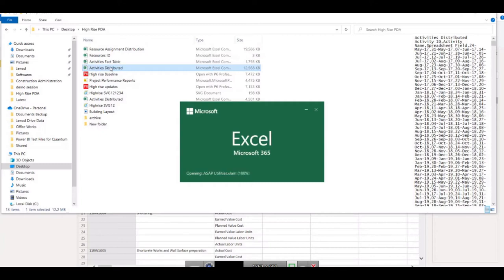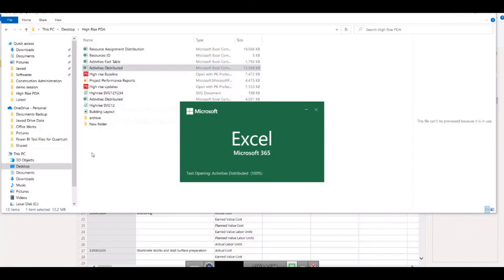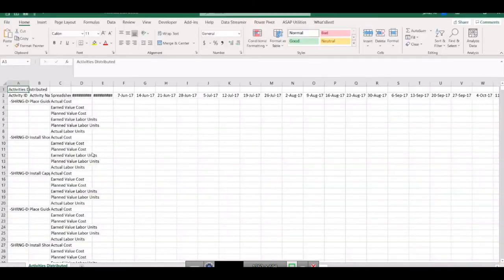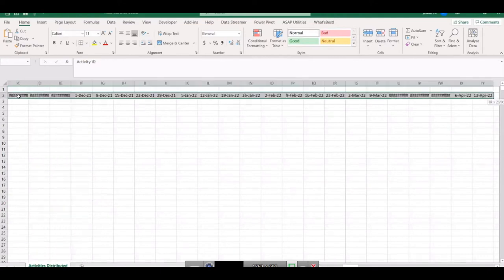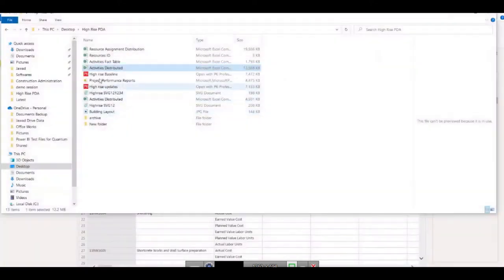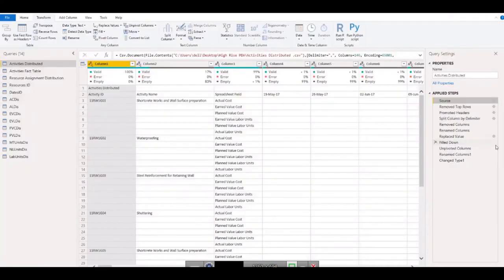And for a portfolio, for example, you have brought 3 projects here. Next time if you bring 4 more projects, total 7 projects, you will be doing the same thing, so that whenever you are adding new projects, you need to make sure how many columns you are using. So here the number of columns is 259. So I will change the status to 259 for this part. I will go in source and change the columns to this. Rows are automatically done, so we can verify them as well.